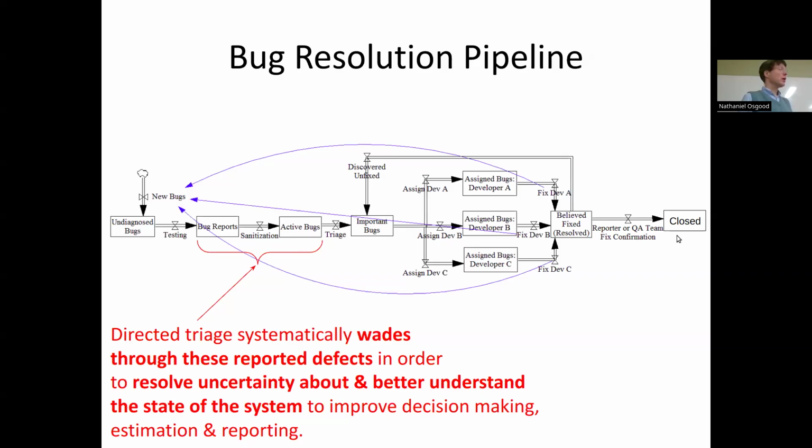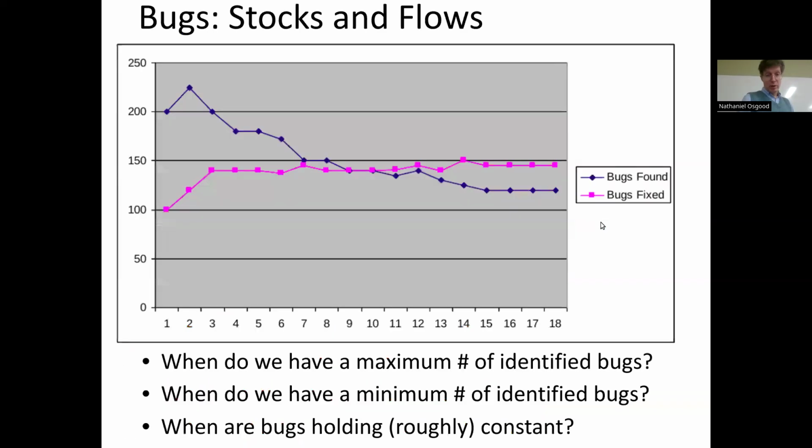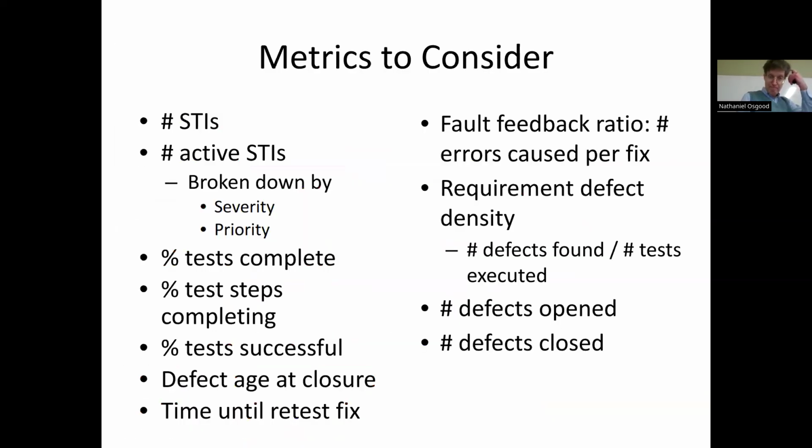it's going to take a while to converge. There's a long time here till it gets assigned to developers, till we find, yeah, it's a valid bug, it's sanitized. If there's a month here, we're going with a very slow cycle time. If it's a week here, you're not doing too badly. If it's a day, hey, you're keeping up with that very well, and you're right on top of it.